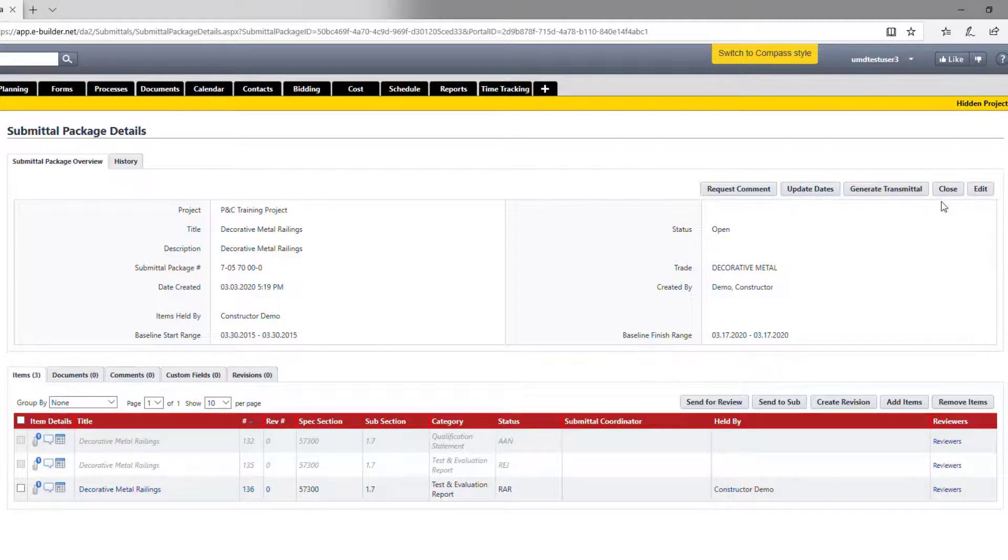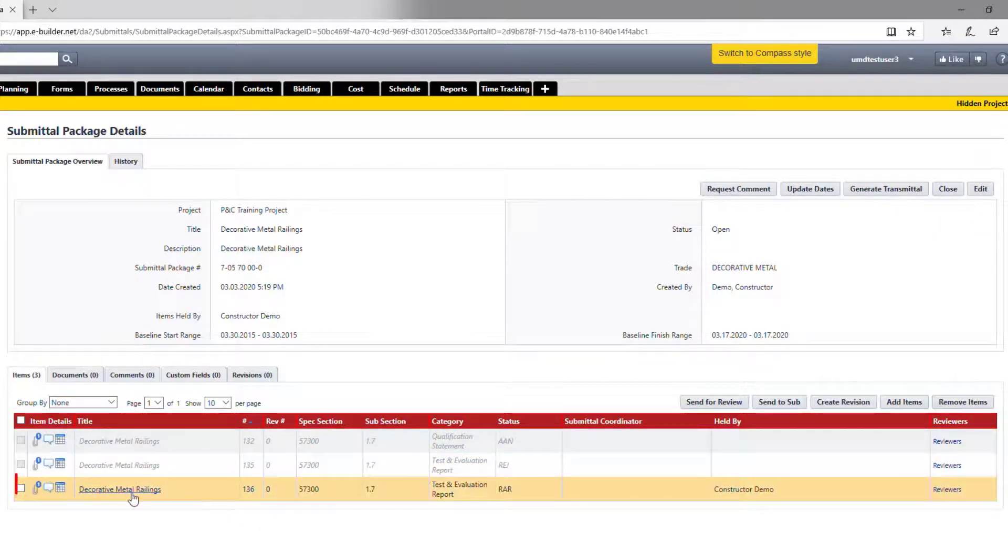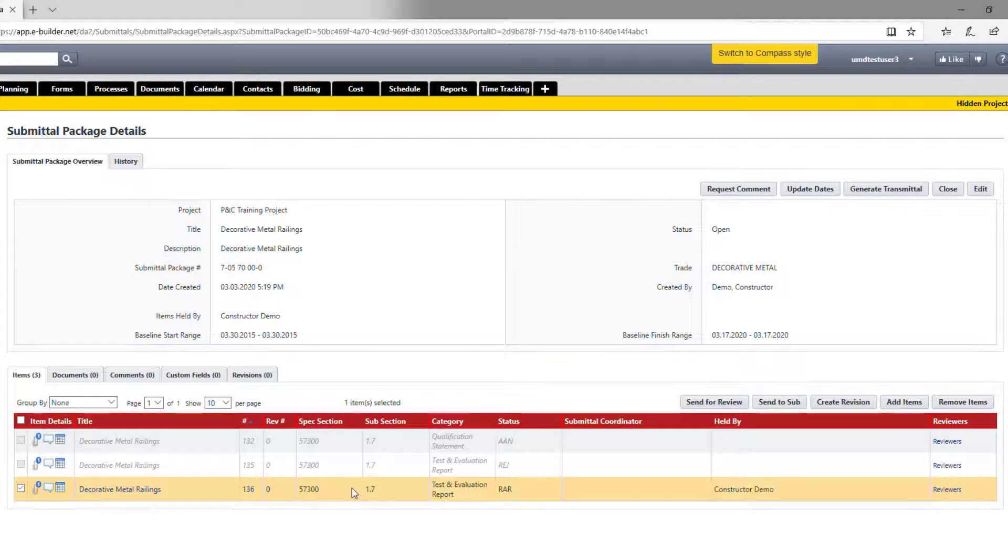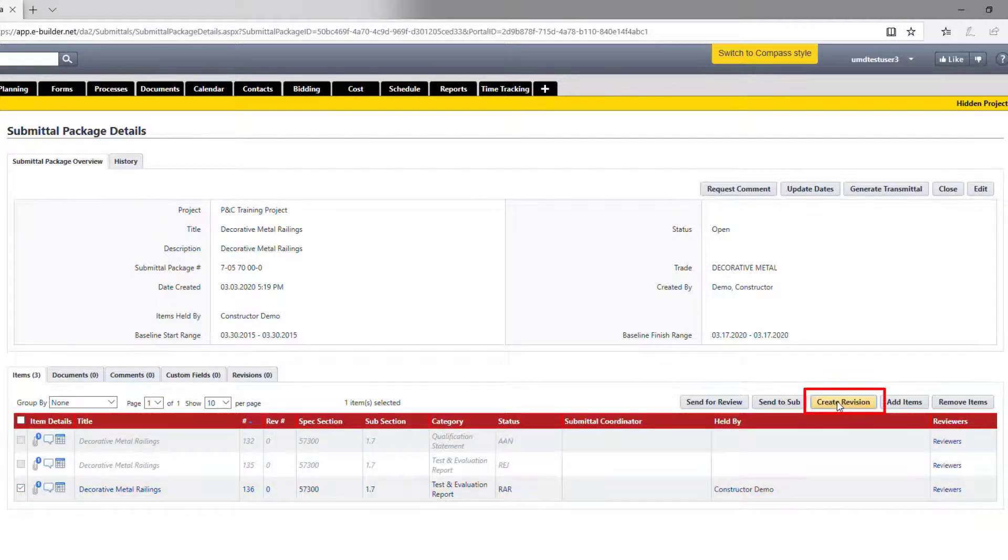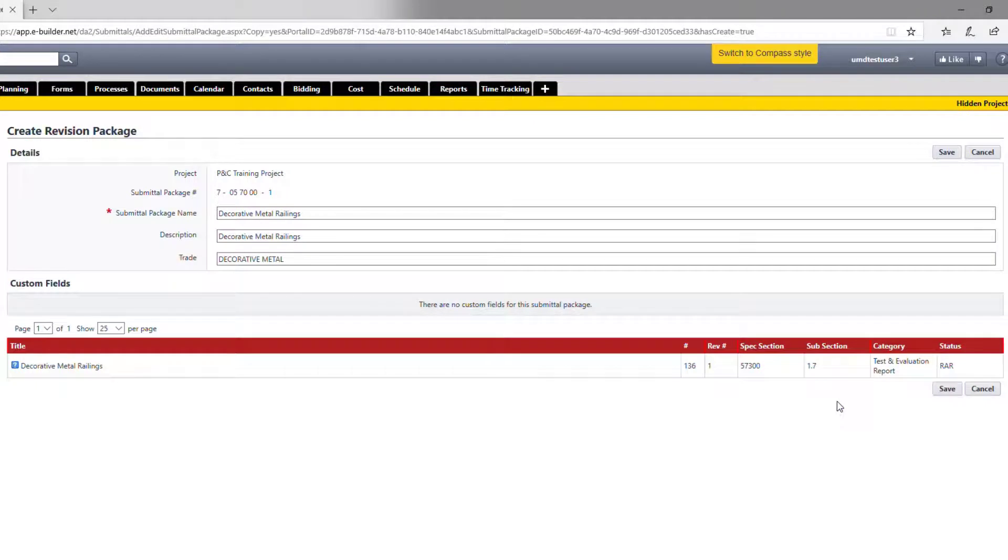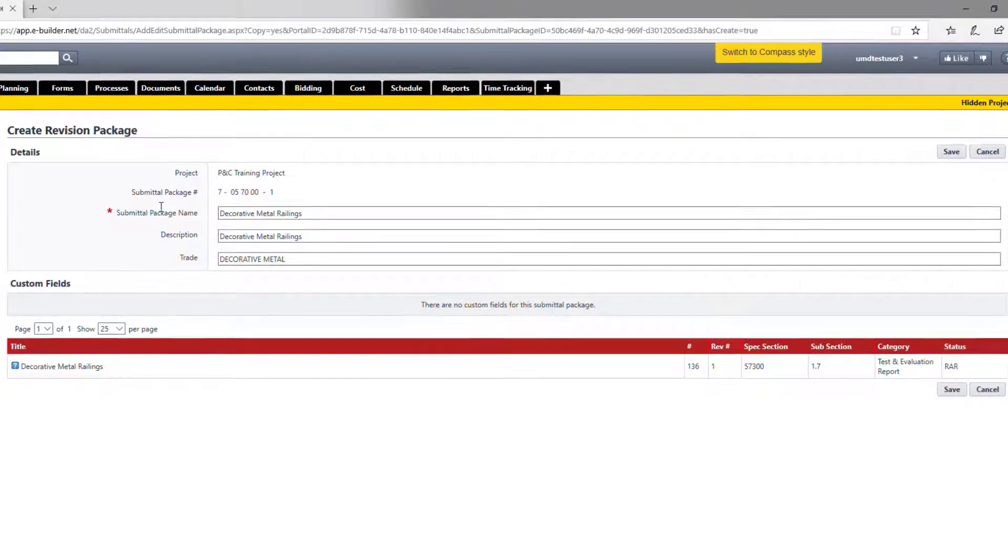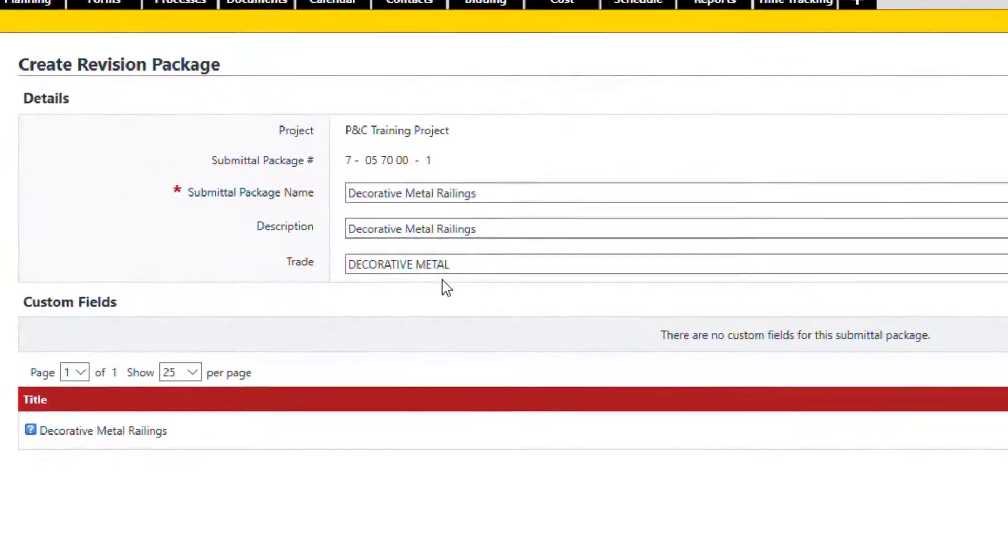Now we close the first two items. The last one is marked revise and resubmit. Please select the revise and resubmit items, either one or multiple, and then click on create revision. As soon as you do that, e-builder is going to create a new package carrying over all the existing package information.